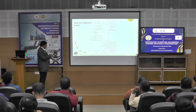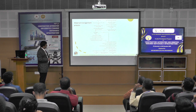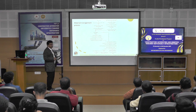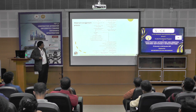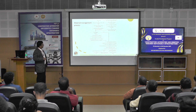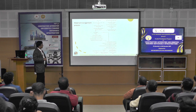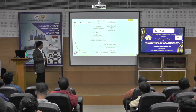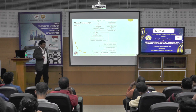For project-level procurement, the project procurement team floats inquiries to suppliers, receives quotations, evaluates them, and selects suppliers through negotiation. After authorization of the EMR, it is checked whether a supplier has already been decided by central procurement. If not, the project procurement team negotiates based on received quotations. Through either central or project procurement, a supplier is selected and a purchase order is generated, authorized, and sent to the supplier.